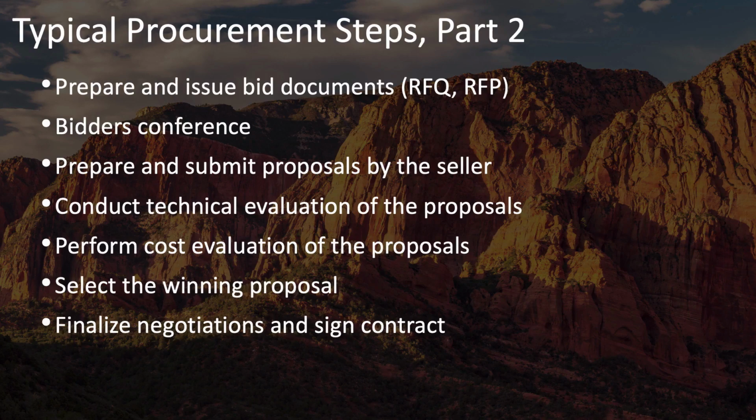You may well need to have one or more bidders conferences, and then the sellers will prepare and submit their proposals. You will then need to conduct technical evaluations of the proposals, perform some cost evaluation of them, and make a decision and select the winning proposal, and then move on to the final step of finalizing your negotiations and signing a contract.